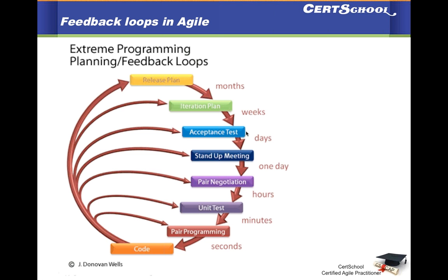A lot of time I get this question, is it really possible to get feedback from customers at all times? There could be projects and products where the customers are not very easily accessible. However, it is a commitment that we have to negotiate as a part of an agile project or an agile charter, that the customers would supply us with acceptance tests. And these acceptance tests are coming in at regular intervals.